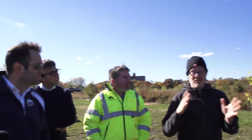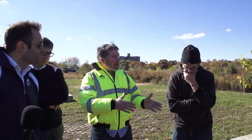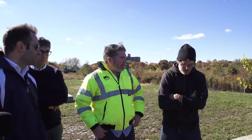It's just, as you said, the level of uncertainty is high in a project this complex. Right. And I think that makes the community nervous. Right. In terms of what then results and what's going to get cut. And just to clarify, that level of uncertainty is just based on where we are in the design. Yeah. As design progresses, you'll get more certainty about... Right. As more of these decisions get made. Right. You can refine those numbers. You're at 30%. Not even.